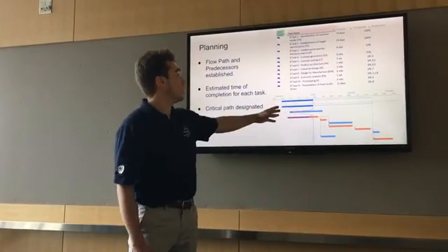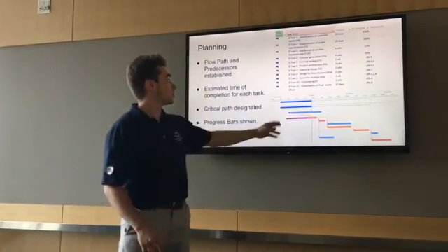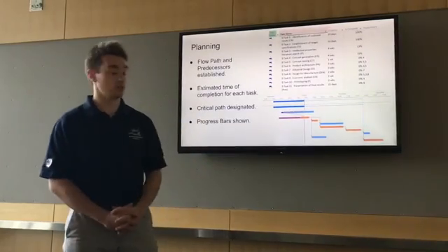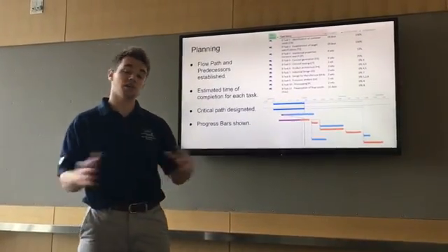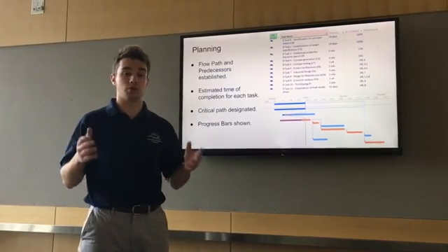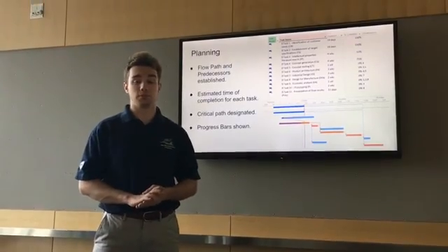What you can see here is tasks 1 and 2 have full 100% complete bars, whereas task 3, our intellectual properties and literature search, is only 13% complete. We're going to use these, like I said, throughout the scope of the project to make sure we're on time, sticking to deadlines, and delivering the project by the 5th of December.